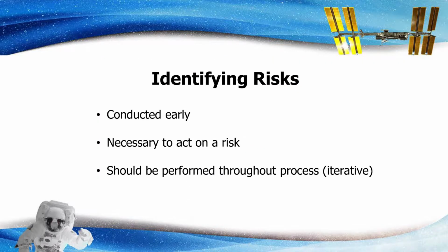Identifying risks is an important aspect of risk management. Without identification, it is impossible to analyze and plan for actions. In identifying risks, you are collecting or gathering those related to your project. Typical methods of gathering risks include but are not limited to brainstorming, assumptions analysis, and performing a strengths, weaknesses, opportunities, and threats, or SWOT, analysis. The overarching goal of these methods is identifying and examining the source and defining and categorizing the risk.